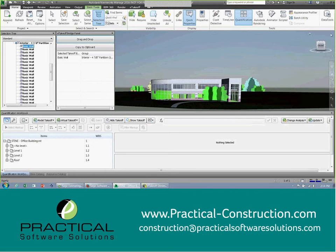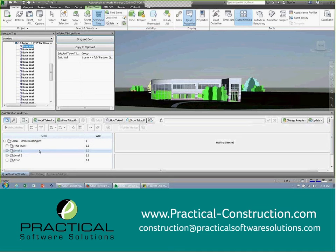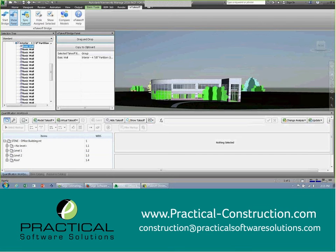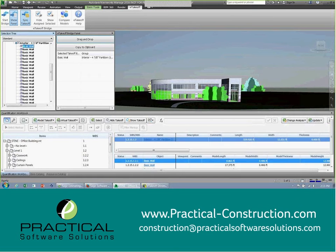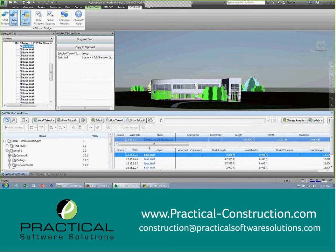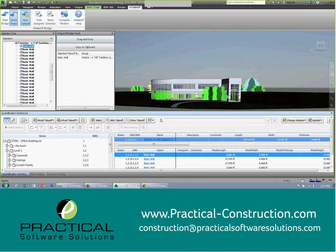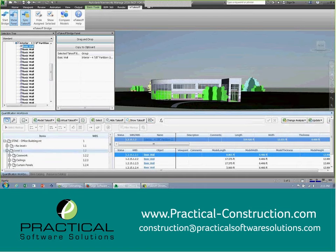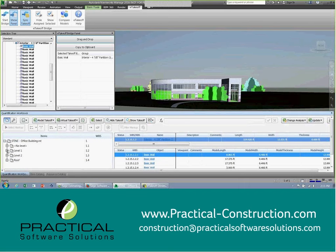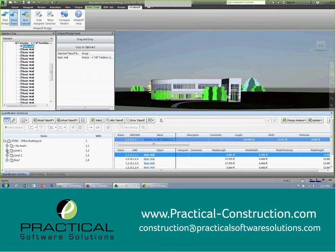In this case right here, we have the quantification workbook that will allow us to strip away that information. When we look at this basic wall right here, now what we can see is all of the details for the walls and then the summary of those walls as well. The other thing that was a time-consuming process is we would move all of these objects and bring them down here into a format or a structure that worked for us, 16 division, 48 division, unit format. Well, we don't have to do that anymore because we'll utilize the Sage Estimating database structure that we built to create that structure for us just as a matter of process.